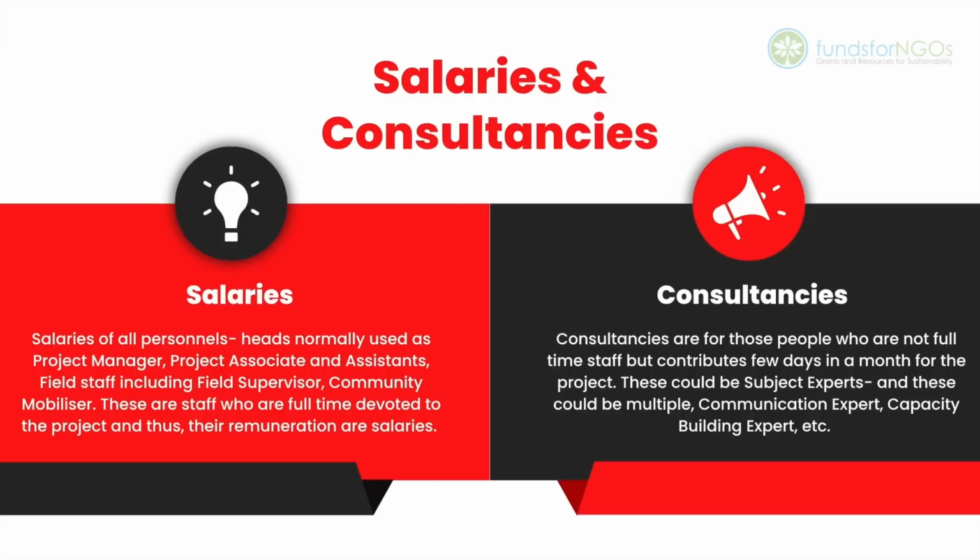Salaries and consultancies. This head must cover remuneration of all persons working or contributing to the project. Salaries of all personnel, with heads normally used as project manager, project associate and assistants, and field staff including field supervisor and community mobilizer. These are staff who are full-time devoted to the project and thus their remuneration is salaries. Consultancies are for those people who are not full-time staff but contribute a few days in a month for the project. These could be subject experts, and these could be multiple, like communication expert, capacity building expert, etc.